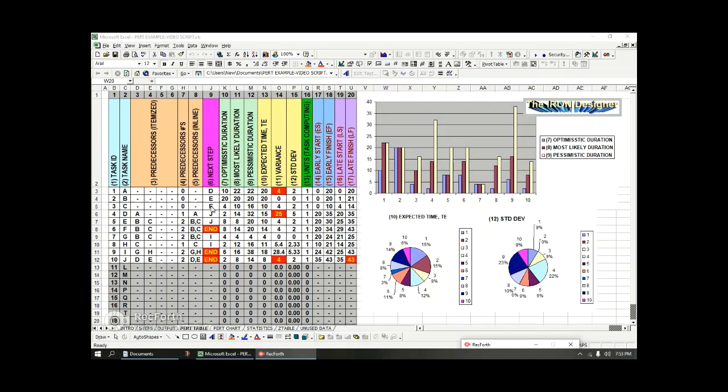And also at C, the next step is E. So if you're at E and you look back, you would go to C. If you're at J, you look back to D. J also looks back to E. Just like here, J needs D and E completed first.